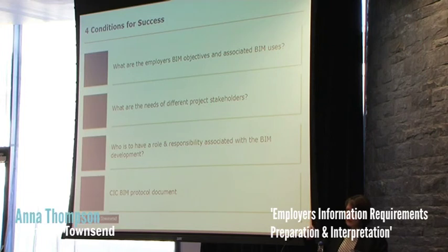So we've got quantification issues to start with. The contractors and project managers, if they take that model and want to break it down, have an issue because it's just got one big object, one column. So the designers haven't thought about how the model needs to be constructed that other people are going to be using it. And it's a big learning curve at the moment. If they printed out plans and sections from that model, that issue would never have been brought up. We would never notice that. And we'd carry on in our traditional methods. So it's about communicating, it's about testing and working together.